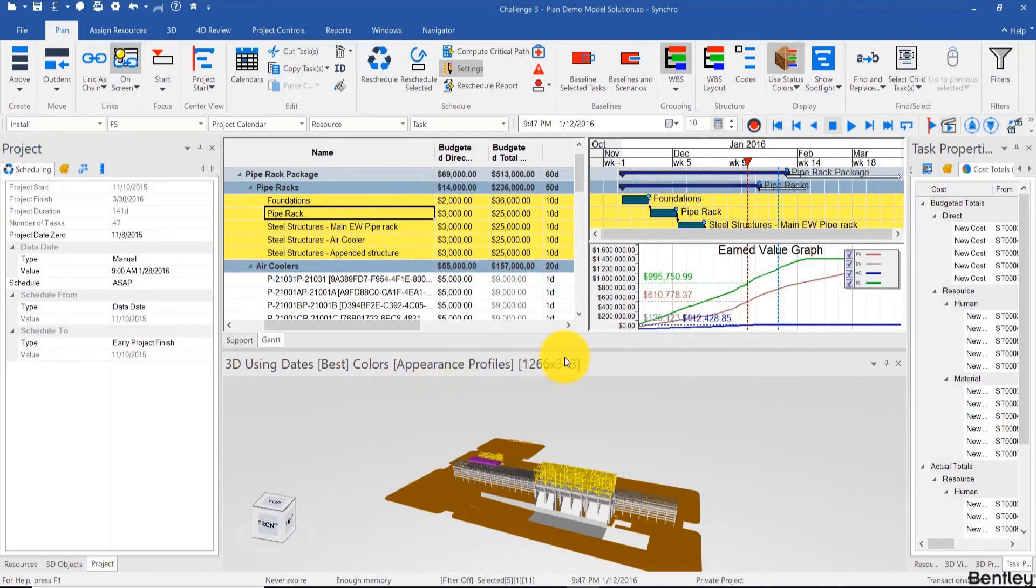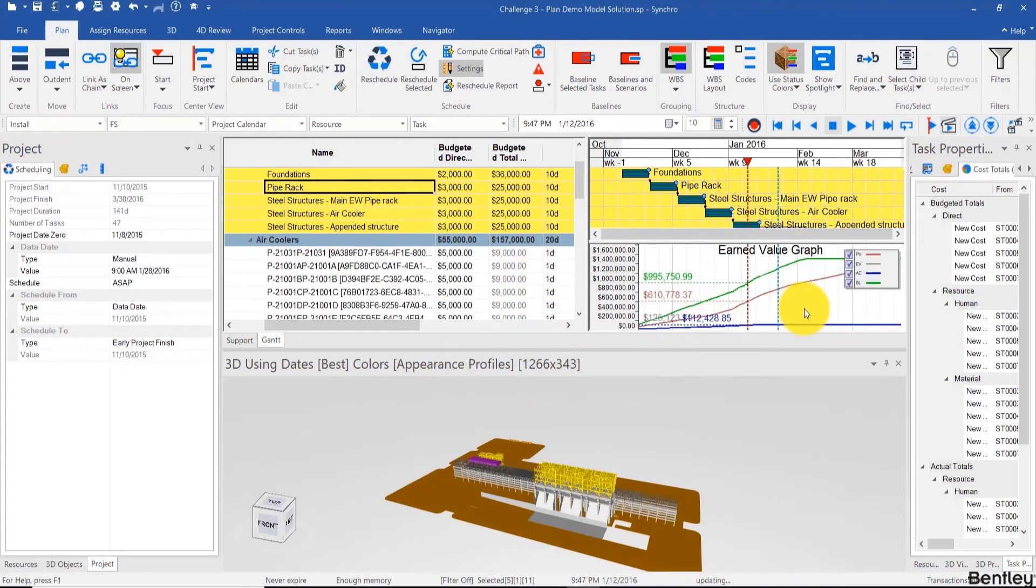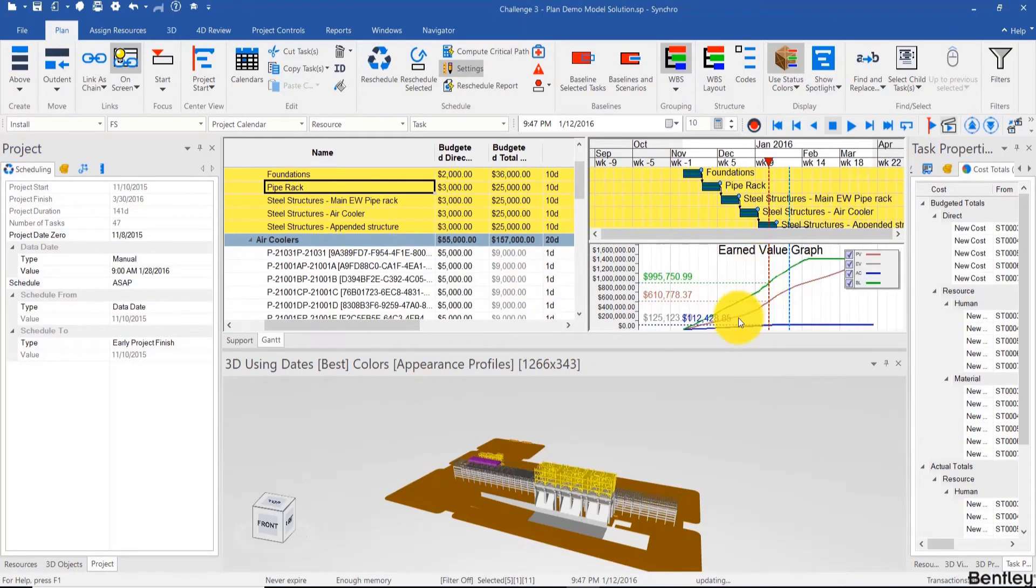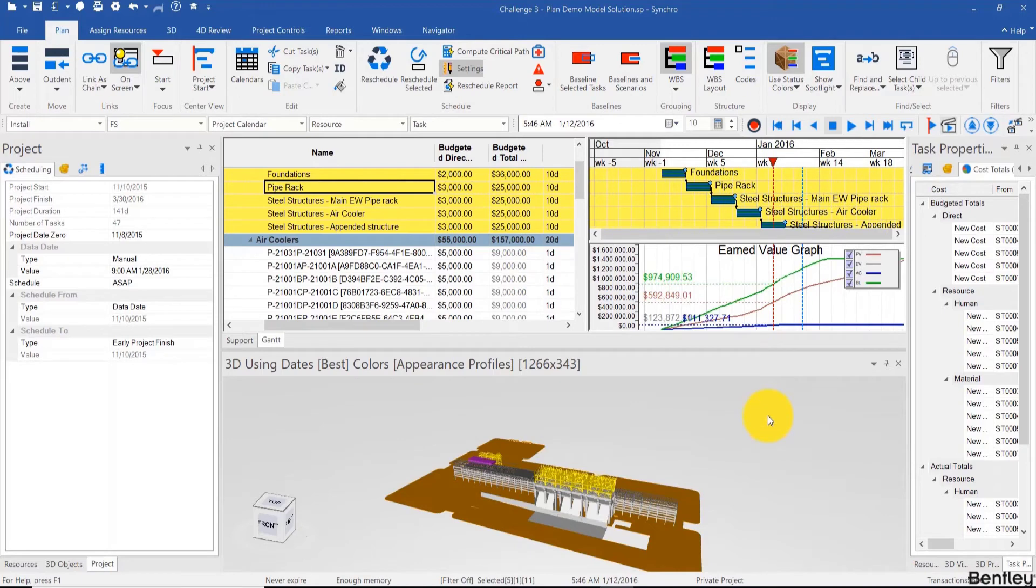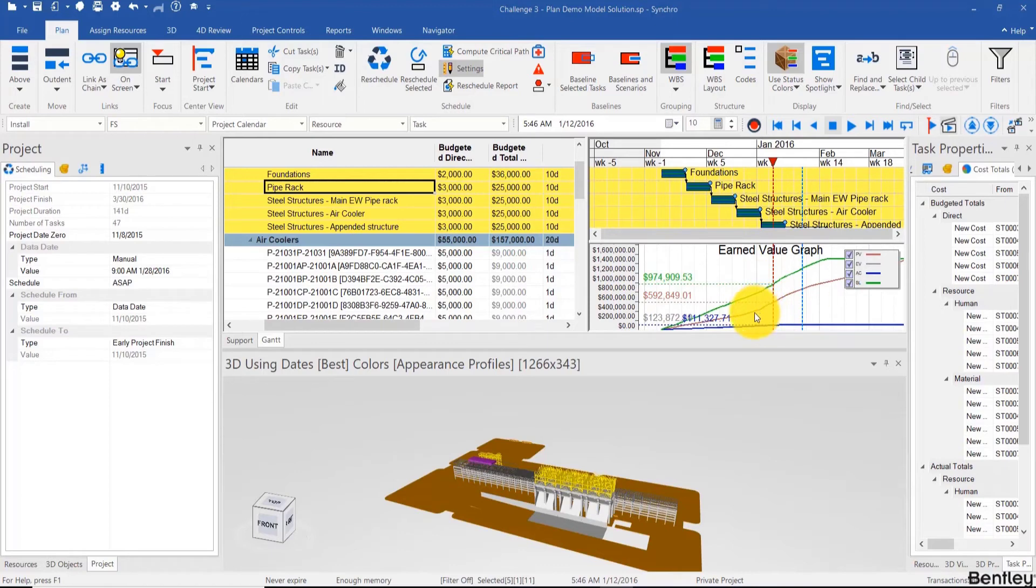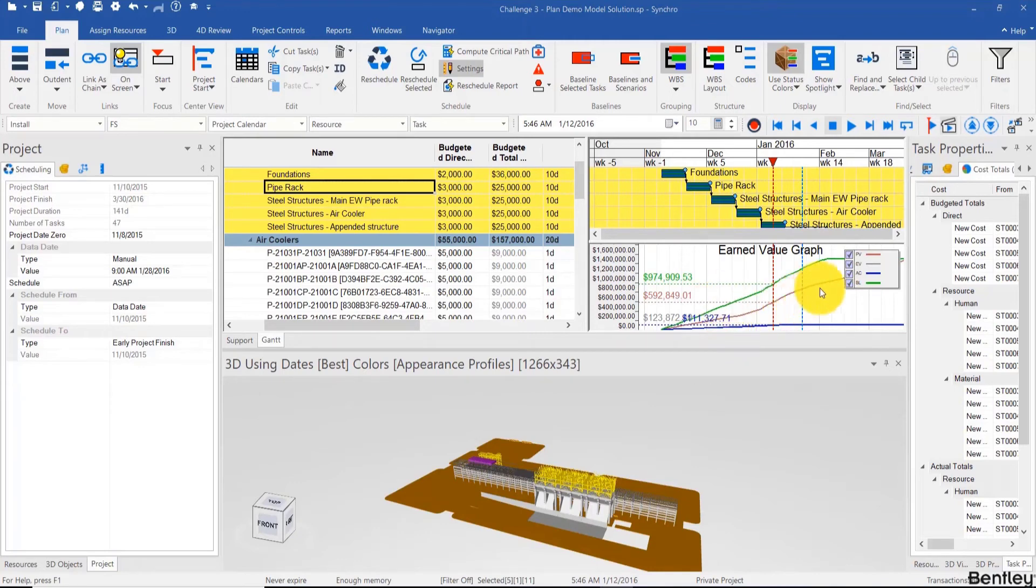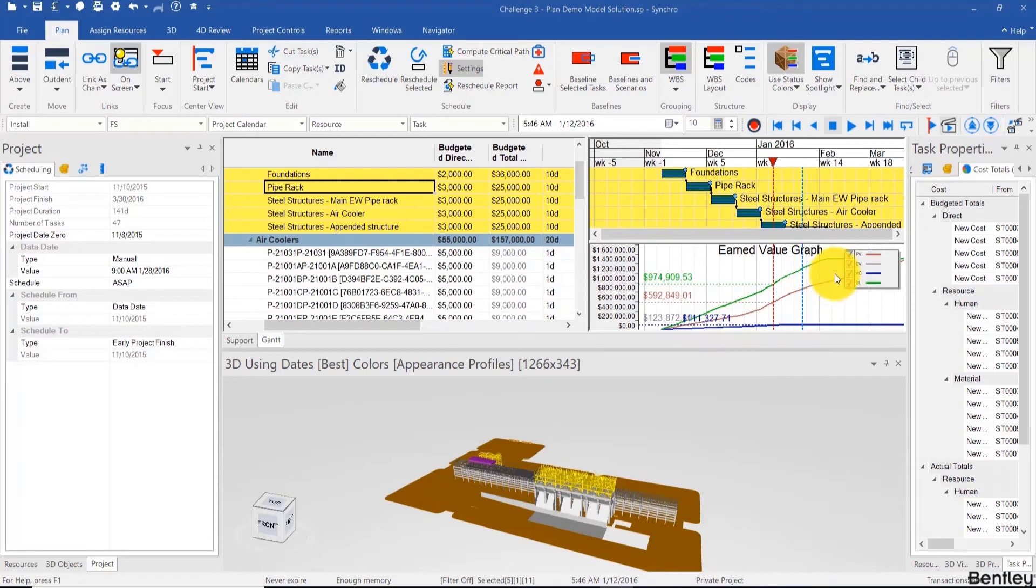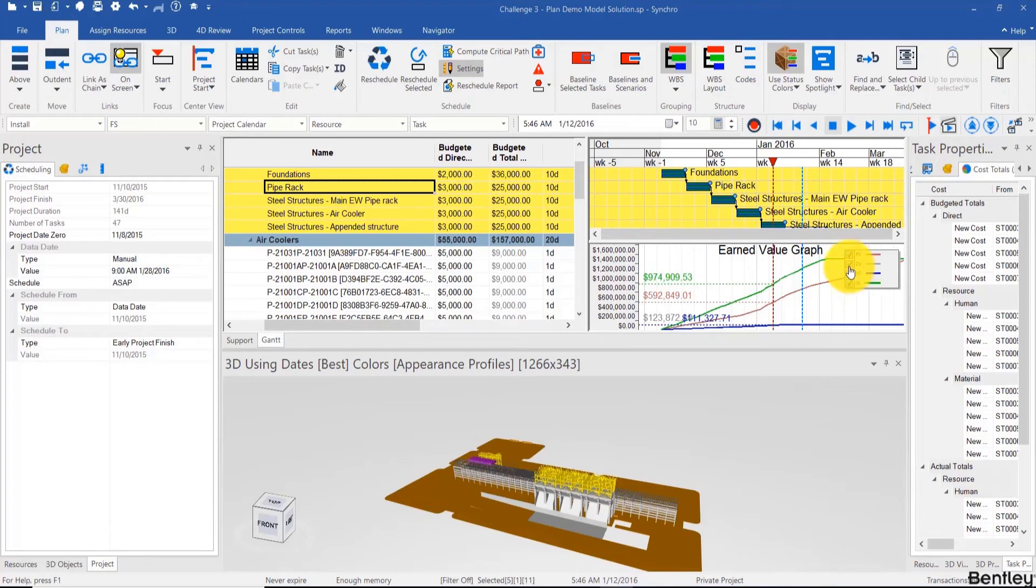And we can choose specific dates for each one or the planned start and the planned finish. I'll stick to the planned stuff, and we see the blue line over here rise up. Now let's interpret this graph a little bit. Some things may pop up to mind, for example, why is the blue line activated and raised up although we haven't talked about actuals yet? And why does it not perfectly match the gray line? That's because part of the actual costs is actually automatically updated, and part of it has to be manually updated. We'll talk about that in the next video.